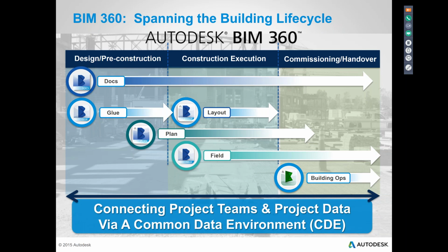They can even start commissioning, and that's a very important part. They can start commissioning equipment using Field as well, putting the additional data fields in as the equipment is coming on site and going through pre-functional checklists, startup procedures, commissioning procedures, and then even handover procedures. These are all different modules that are inside of the 360 Field. So again, a very powerful tool there.